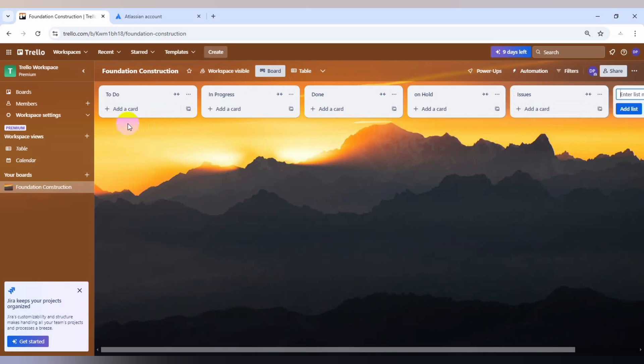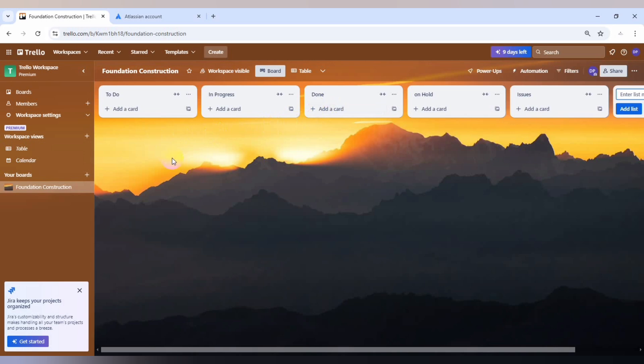As you can see, to do are tasks that need to be completed for foundation construction, while in progress are tasks that are currently being worked on. And then we have done, which are completed tasks, and on hold are tasks delayed or put on hold. And the issues, as you all know, are problems or concerns that need to be addressed. I will use the Microsoft project template to just pick out some list of tasks that we will use as the cards.